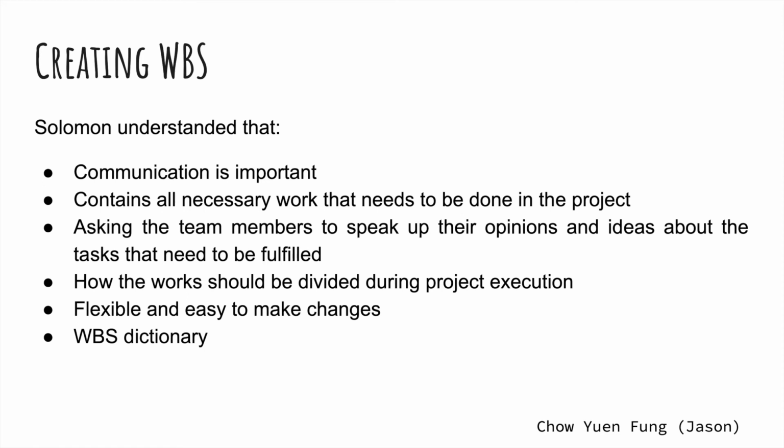He ensured all team members had agreed on the division of workload to prevent unfairness and unnecessary conflicts. Besides, the work breakdown structure created is flexible and easy to change in case of any unexpected situation or client request. Last but not least, a WBS dictionary is also created during the meeting in order to clearly explain each WBS task in detail for reference.